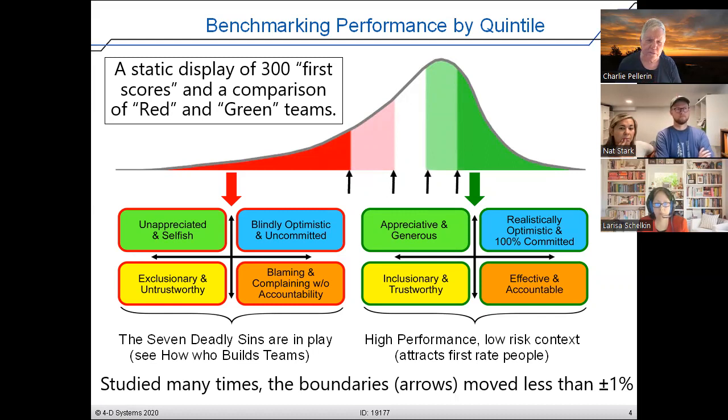So I found 7 of them. I called them the 7 deadly sins. And so you stop and work as a consultant to remedy these. For example, if the problem's not enough money, I would try to persuade them to tell the truth to the customer, make a 4D request, tell how this happened, and ask the customer either to let you de-scope it or to give you more money. That's basically living in integrity. Some would do it and some wouldn't.